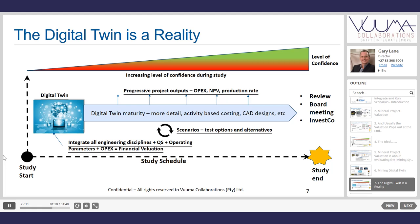As the project progresses, you can add more detail — more detailed activity-based costing, more detailed designs — and run scenarios continually. Your level of confidence increases so that when the board meeting or review happens, it's not one big surprise. You literally have the OPEX, NPV, and production rate coming out of that model continually as decisions are being made. Decision-making can therefore happen during the project, and you can decide to stop the project based on financial outputs.